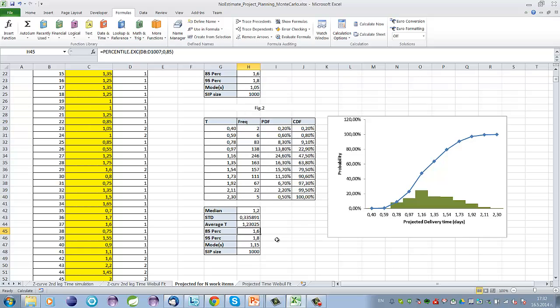What is interesting here is that the result is again variably distributed, which is here to prove that the lead time, because when we have a scope of one work item, the lead time per work item will equal the delivery time for the project. Which means that in this case we simulated the lead time for one item flowing through our system, and it is again variably distributed.